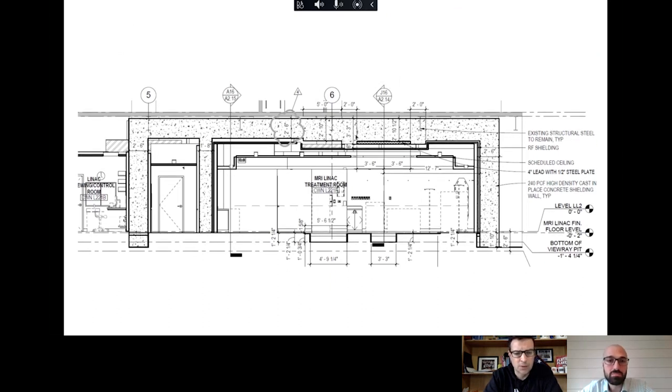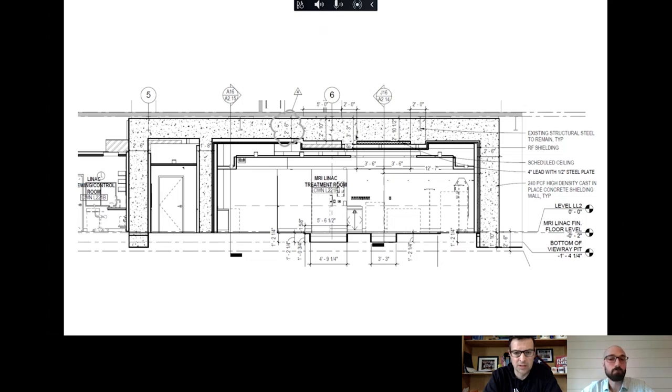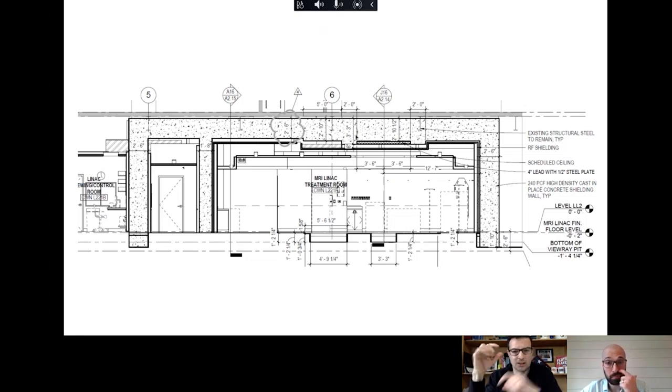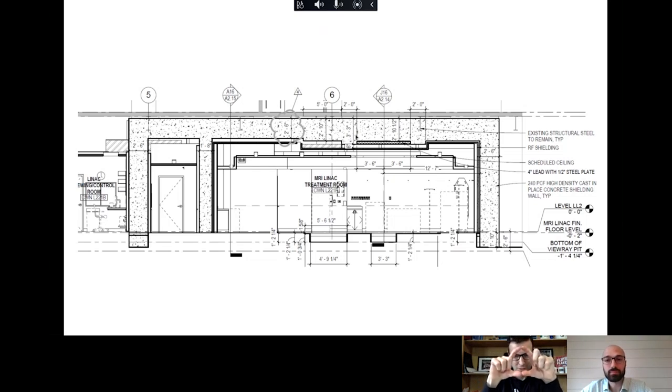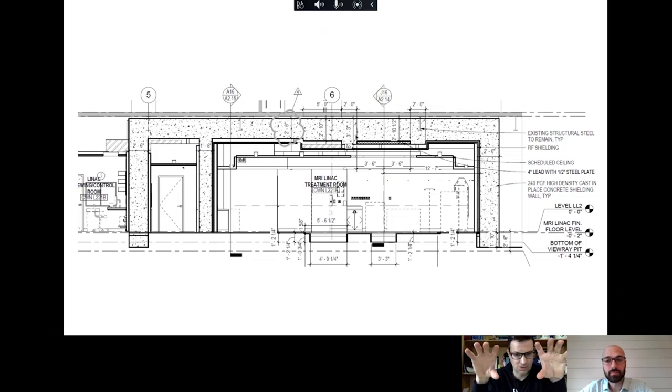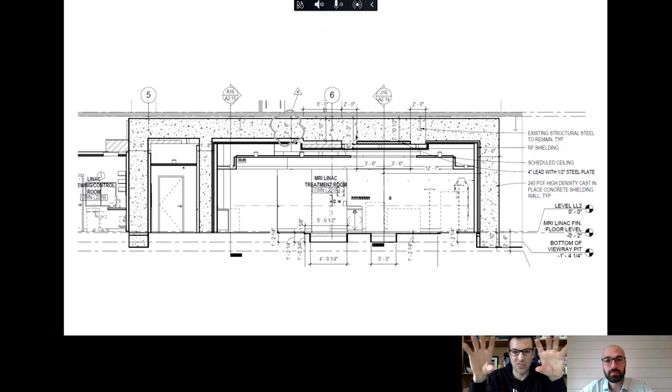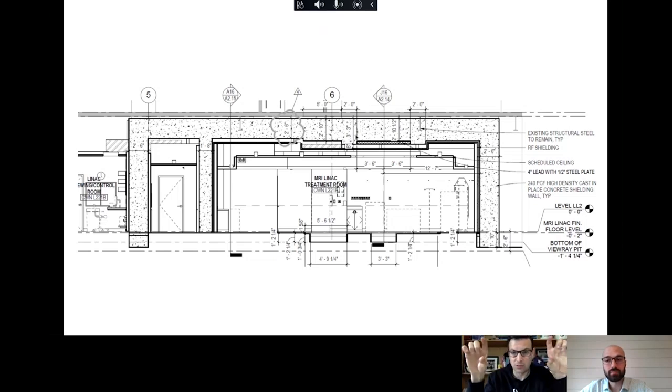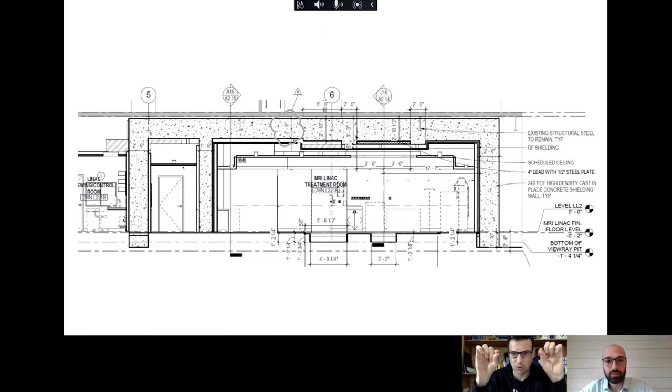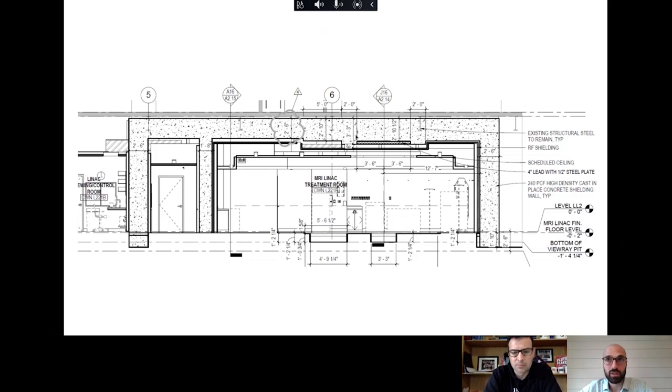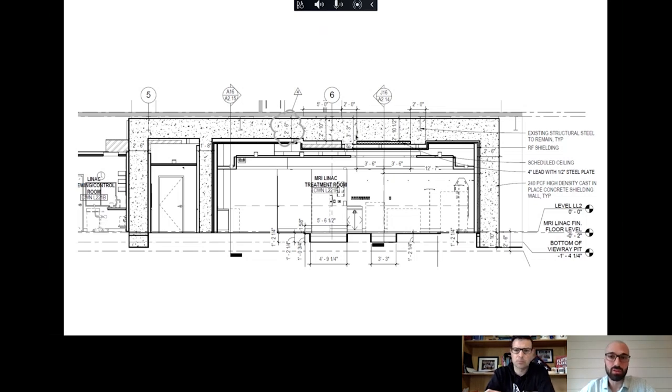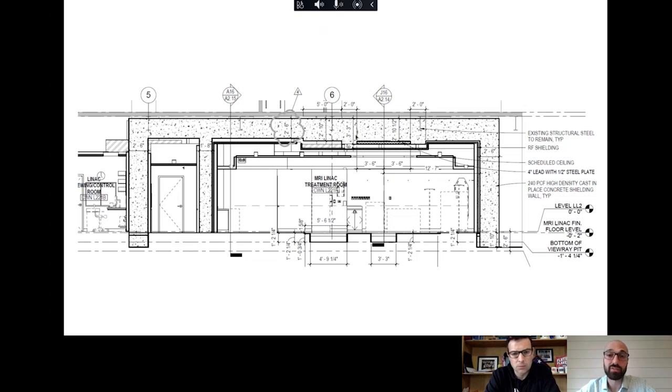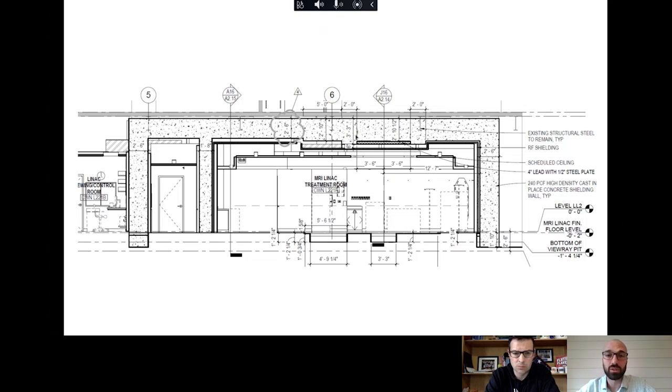We're looking at a section through the room. And essentially you had the existing ceiling that was the floor of the floor above. And now there's just basically a giant concrete ceiling. But it looks more like a beam because it's showing that it's 2'6 to 2'10 thick on the underside of the floor above. But it looks like it's not touching. We were leaving ourselves 3 inches just to be able, because we were going to have to core through this interior slab. We had to core 8-inch cores every 5 feet just to be able to place this. And that gap in between was really going to be out of our control. So we just had to leave a little bit of an allowance there.